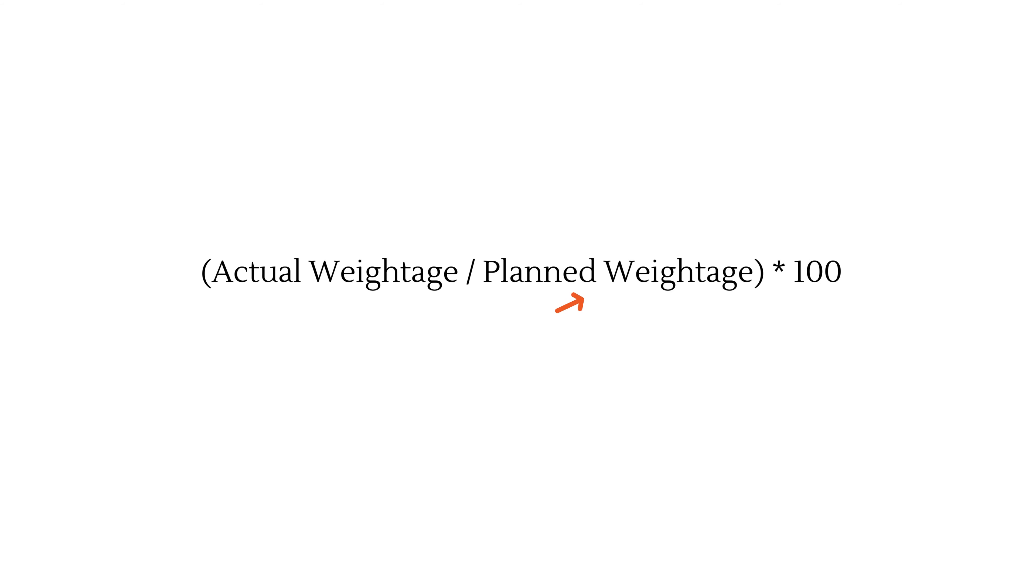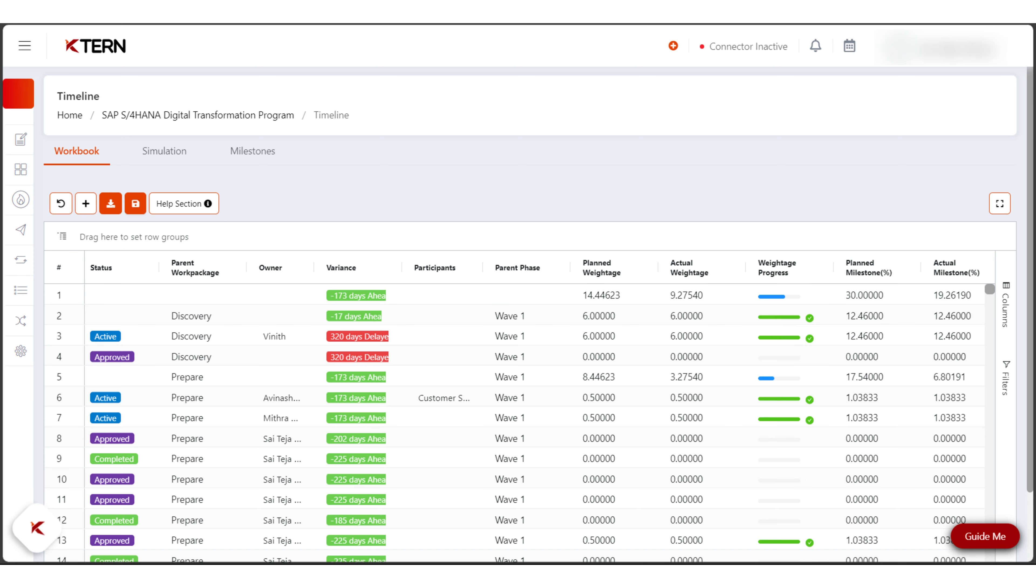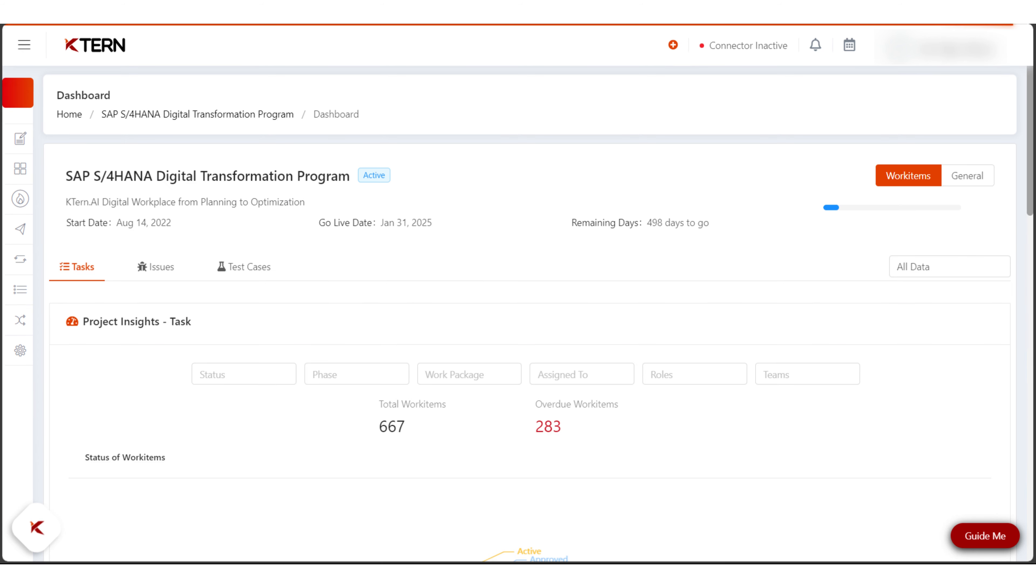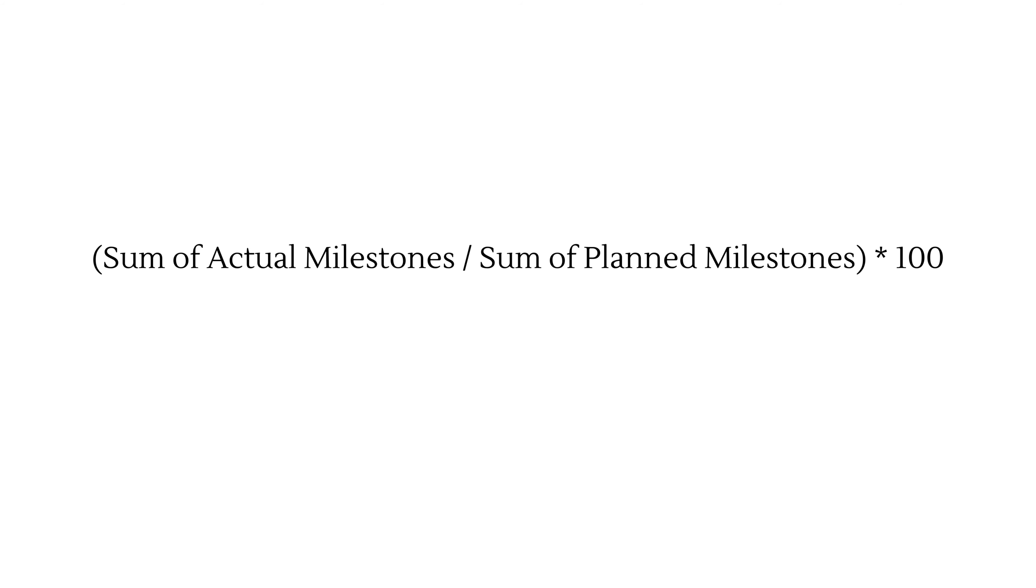Task milestones: unlike task weightage, milestones are set only for a specific level of the project plan. To find your project progress, it is sum of actual milestones divided by sum of planned milestones multiplied by 100.